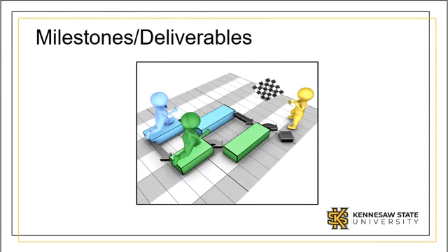Well-structured projects have a set of stages or milestones that are used to keep the project on track and to help bring a project to completion. Establish key milestones at all phases of the project. Make them specific, meaningful, and tied to the overarching aims of the project. This sets up a system such that when milestones are not met or partially met, the project team can implement corrective steps and allocate additional resources to right the ship.